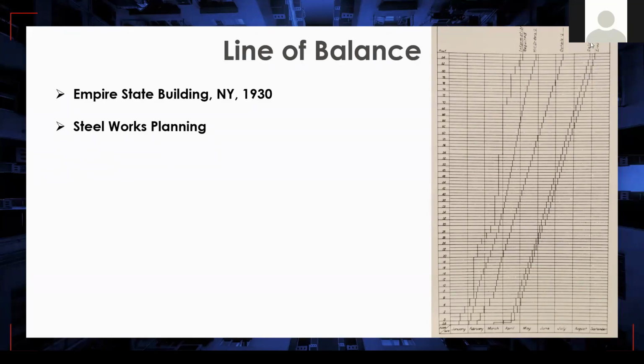So any delay of these delivery activities will automatically delay the execution of these projects. So this way, we need to make sure that these tight schedules will not be affecting our project progress. And also the other thing that we need to make sure is that these 2 disciplines can represent different resource crews or any other repetitive following activity relationships.